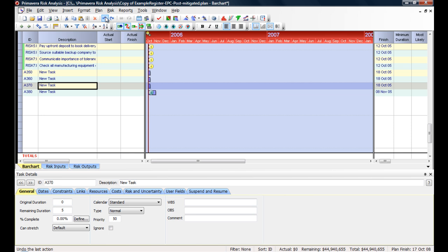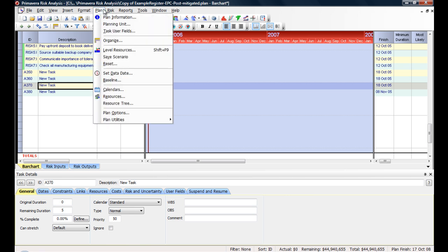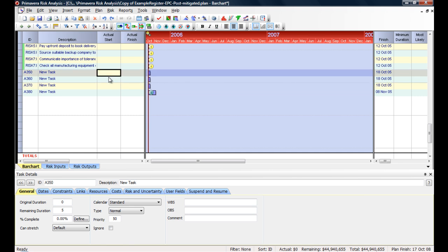The summary structure, though, is going to come in directly from Primavera P6, Primavera P3, Open Plan, Microsoft Project. So if you've already created it, you're probably not going to use it in this, but it is important to know that that is how it works. If you go through and start sorting things by your activity codes and what have you, it actually uses your activity codes to do a similar structure like this.